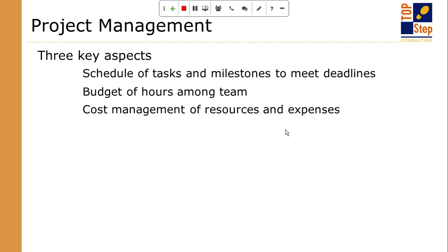So if you were expecting to use a junior associate to do some of the work, but you end up finding that only the senior associates are available, that will hit your project negatively, and although you get the same revenue perhaps for the project, you may actually come in at a lower profitability because you had to use a more expensive resource.